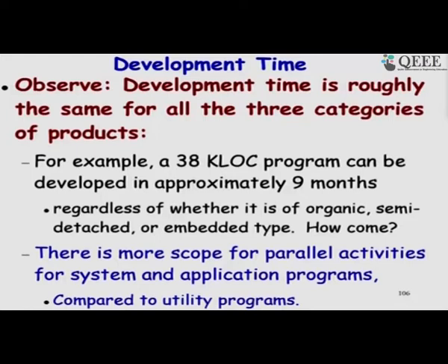And also for very large software, the agile model has been reported to be successful, but there is no large scale study of how the agile model can be used in large projects. If we look at the origins of the agile model, it was meant for small projects with up to 10 developers. If there are hundreds of developers working on a very large project, the agile model was not really developed for that, but different teams have tried out some enhancements to the agile model and they have reported success.